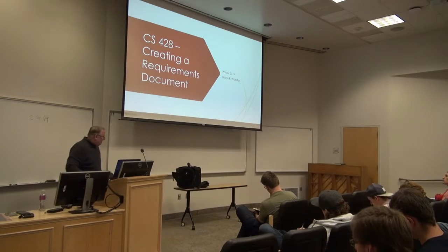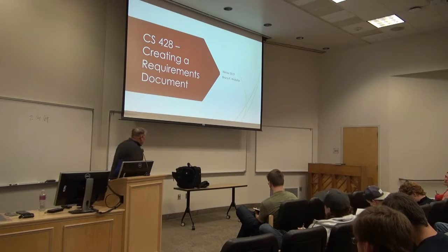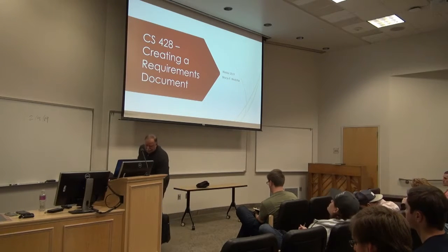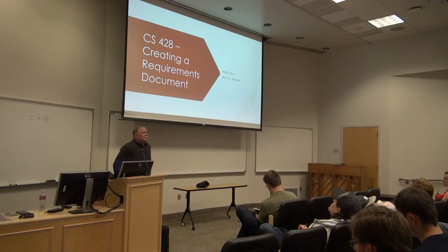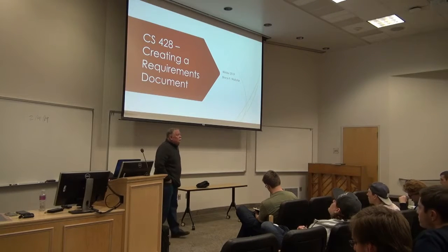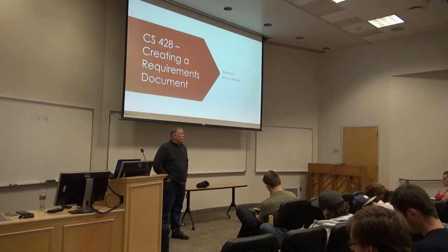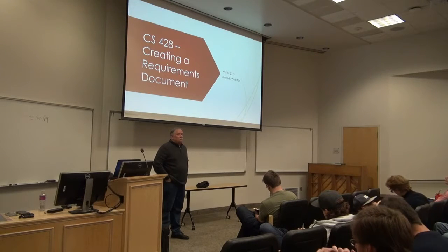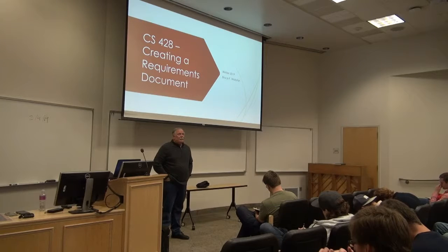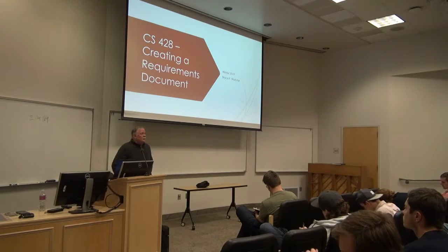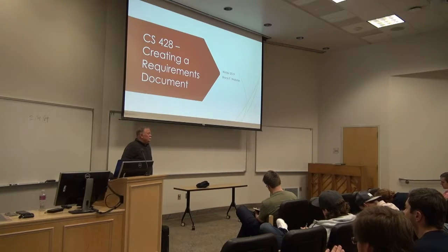Okay, creating a requirements document. This is a major issue in software engineering because requirements are constantly changing and expanding, or if you're really smart, they're contracting. It's always better to remove requirements than to add new ones because you're more likely to actually meet your deadlines.